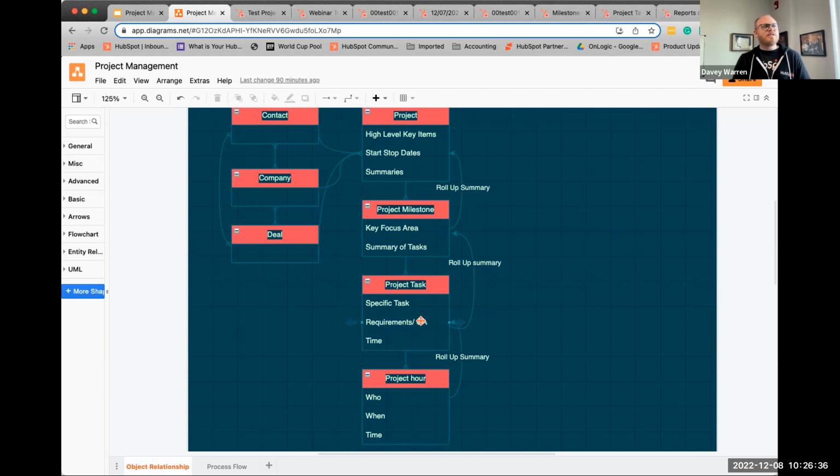Sally comes in, and you'll see that we change statuses. Once it moves to QA, Sally, who is assigned for QA, automatically then QAs the task and logs her hours for QA. And then each one of those line items, I just export project hours every 2 weeks when we do billing, and I input them into QuickBooks using a secondary tool that we're going to be automating here soon. But actually my accountant does it now, so it makes it a lot easier, but it's an easy export. I mark that they've been marked as billable and into QuickBooks, which actually will run up to some numbers on the summary on the project, and it makes it really easy for me.